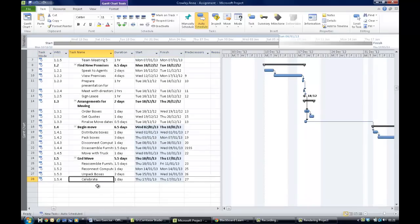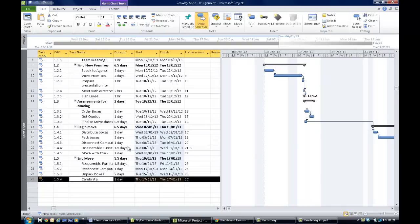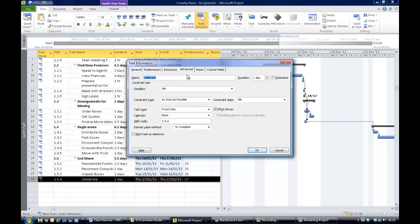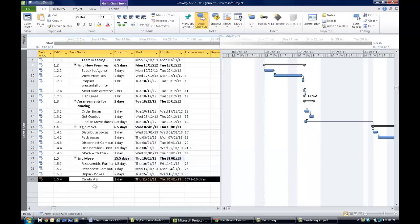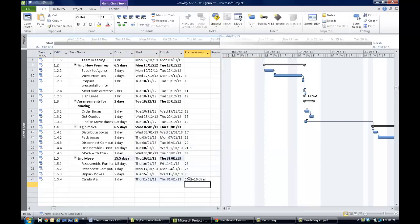The final thing is to put in a lag. A lag is where something isn't going to happen for a number of days. The celebration isn't going to happen until 10 days after unpacking. Double-click Celebrate to open the task information dialog, go to the Predecessors tab, and set a lag of 10 days. Hit OK and you'll see the predecessor now shows finish-to-start plus 10 days, so the celebration happens 10 days later.